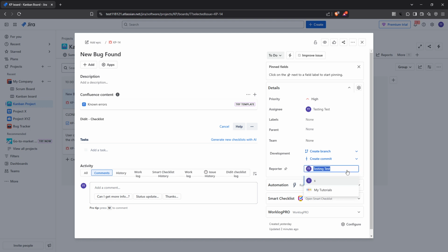Next, you'll need to click on the current reporter's name within the reporter field. Doing so will bring up a drop-down menu. This is where you'll select a new reporter. The drop-down menu is typically populated with a list of users who are a part of your Jira project. If you're familiar with the team setup, you should know exactly who should be taking over the reporting duties. If not, it's a good idea to double check with your team before proceeding.